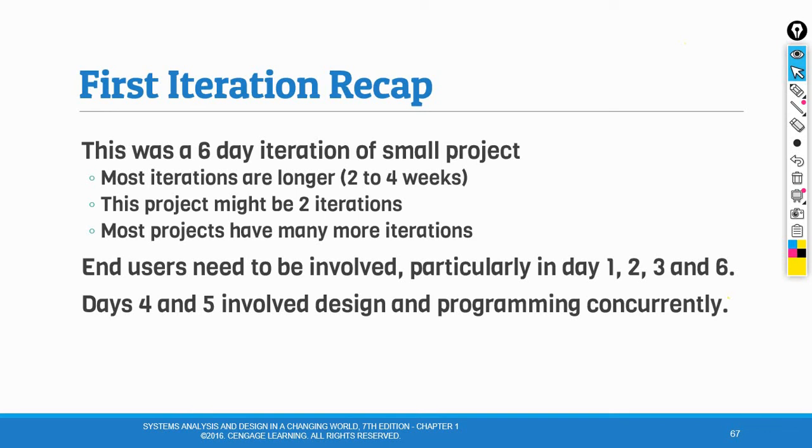That is why Agile iterative projects are structured to handle these new requirements, often by adding another iteration to the overall project. As a final step in a current iteration, or perhaps as part of the planning process for the next iteration, there should be a review of the tasks completed and an evaluation of the success of the current iteration.